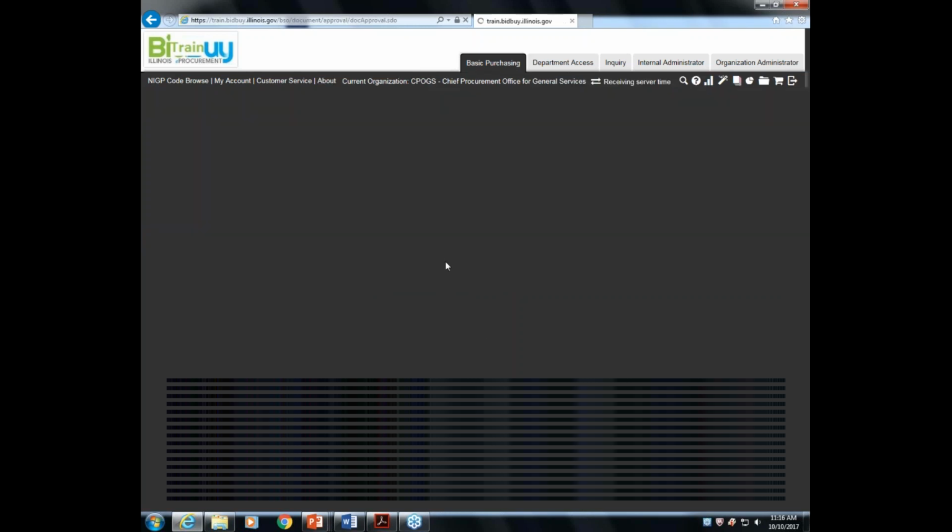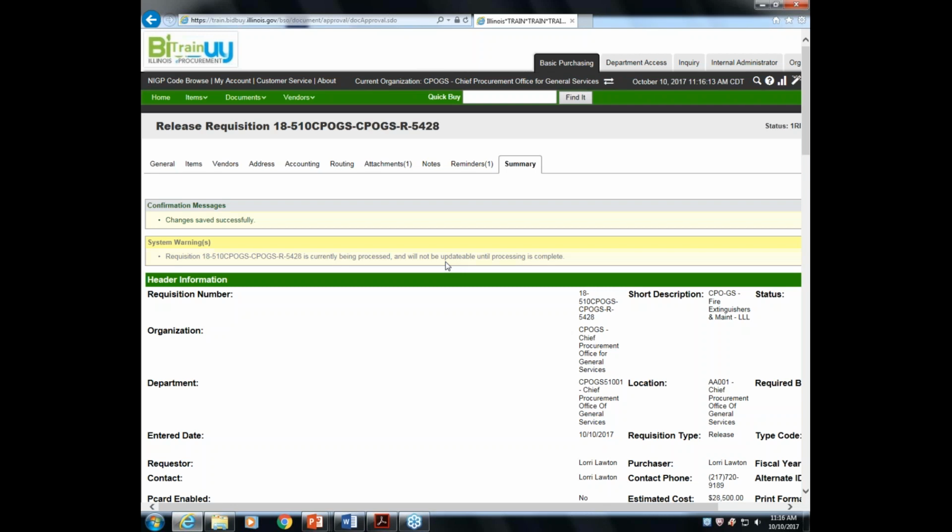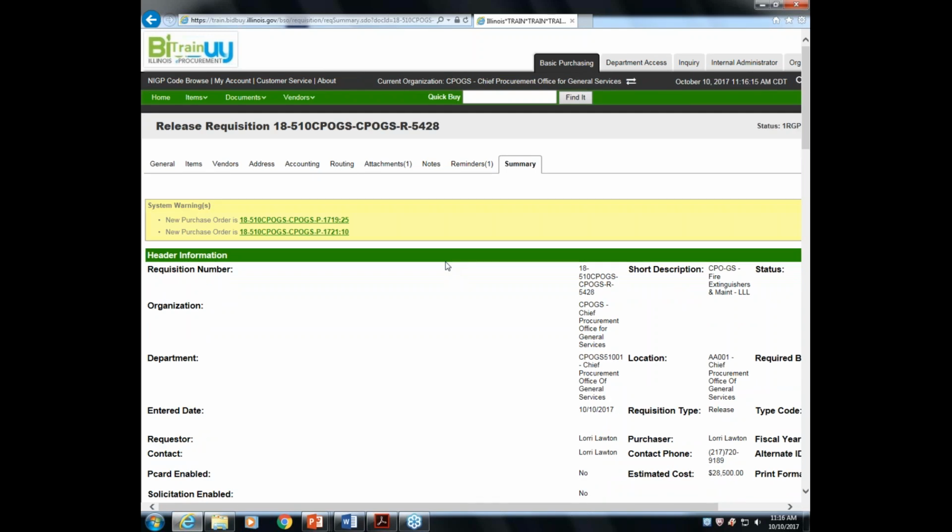In our case, for training purposes, we simply go through and we do an automatic approval. What you now see here on your summary tab is that two separate and distinct purchase orders have been created because in our particular case, we were ordering off two separate and distinct master contracts.